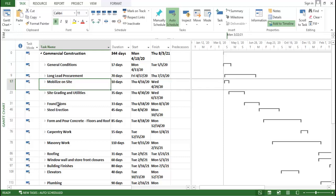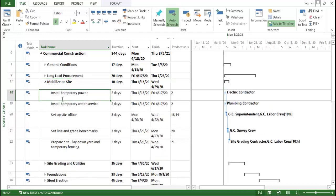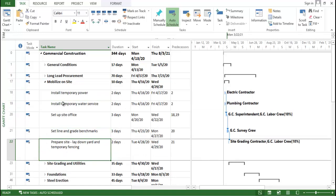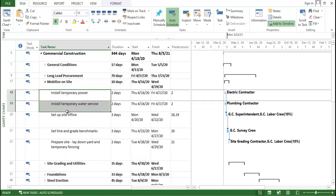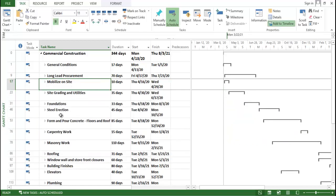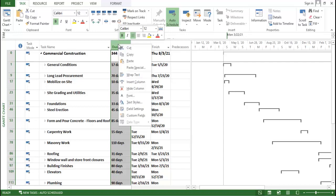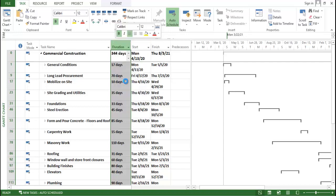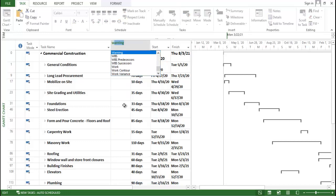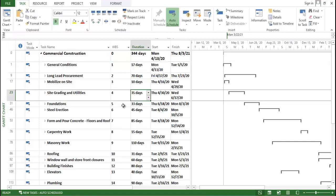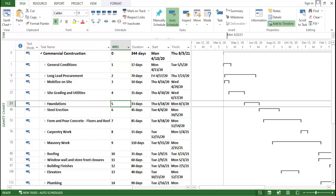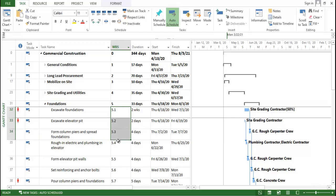These are the main activities we need to carry out for our project. These are the main tasks, referred to as the main WBS — Work Breakdown Structure. The rest of the work breakdown structure related to each main task comes under it as sub-tasks. To see the WBS, right-click, select Insert Column, and type WBS.